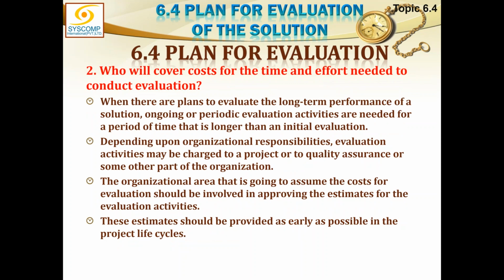Two, who will cover cost and time and effort needed to conduct the evaluations? When there are plans to evaluate the long-term performance of a solution, ongoing or periodic evaluation activities are needed for a period of time that is longer than an initial evaluation. Depending upon organizational responsibilities, evaluation activities may be charged to a project or to quality assurance or some other part of the organization. Somebody has to pay for it.